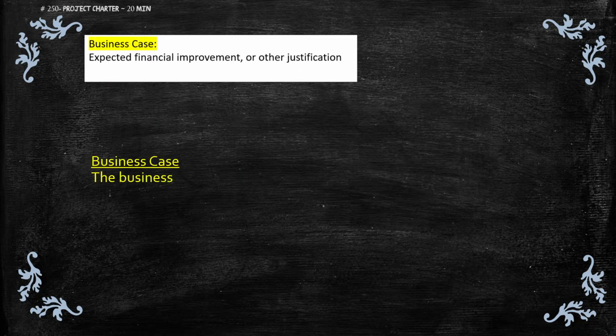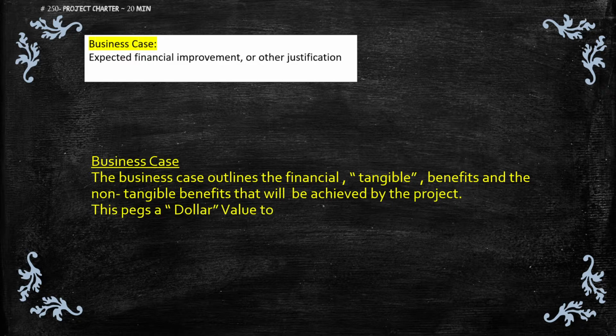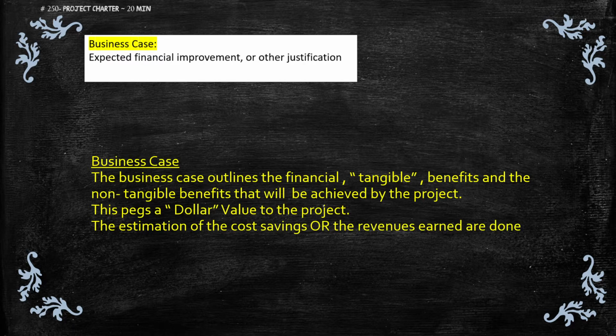Business case. The business case outlines the financial, tangible benefits and the non-tangible benefits that will be achieved by the project. This pegs a dollar value to the project. The estimation of the cost savings or the revenues earned are done in terms of annualized figures.